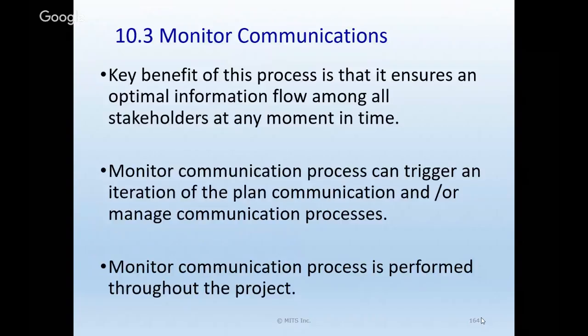10.3 then is going to be monitoring communication. So what we're trying to do here is make sure we're getting the right information out to the right people in an efficient way. And we may have some things while we're monitoring that'll trigger some changes too. Maybe we're not getting information out to all the people we need to. We've got a new vendor or new customer that we want to make sure is included. As it mentions, this can be performed throughout the project, but especially when we're doing the execution work, because that's where we're doing the bulk of our work.